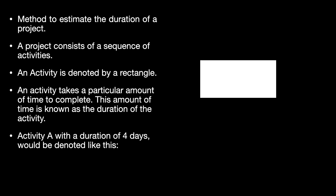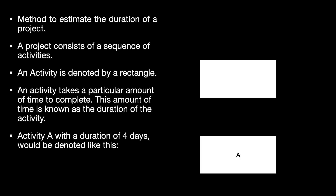So if we had an activity called A with a duration of four days, using the critical path method it'll look something like this. You have the activity in the rectangle with the name in the middle, and the number above which would signify the duration of the activity. Of course a project is more than one activity, because even if the project is small it would be impossible to complete it in one activity.